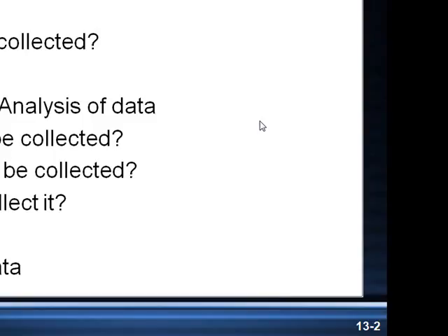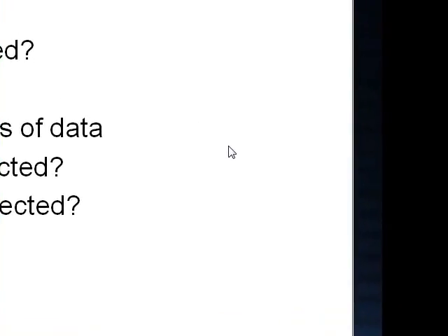Now once we have the current status, the second thing is the remaining cost to complete the project. In addition to the cost to complete it, we want the date that the project will be complete. So again, the first three things are the current status until now in terms of schedule and cost. The second thing is the remaining cost, and the third thing is the date of the completion, so the remaining schedule. The next thing we need to do is find the potential problems that we address now. So things that have gone wrong that we can fix by paying attention to them immediately.